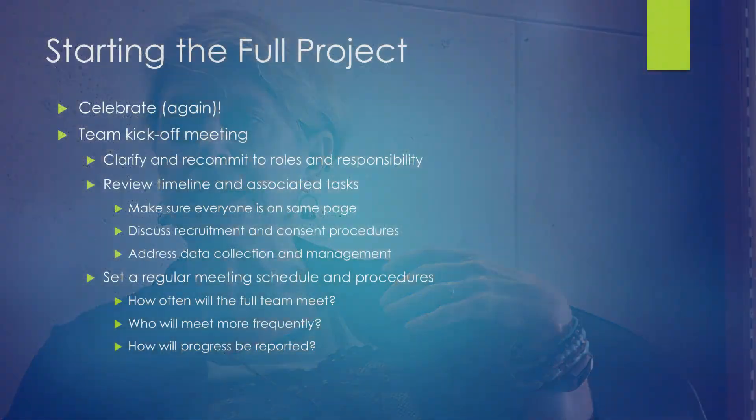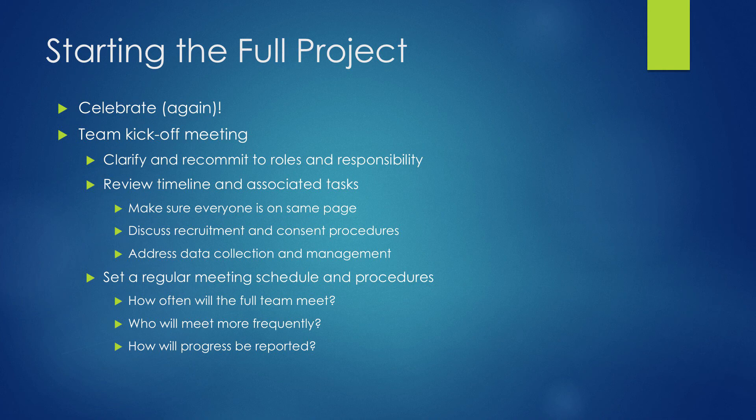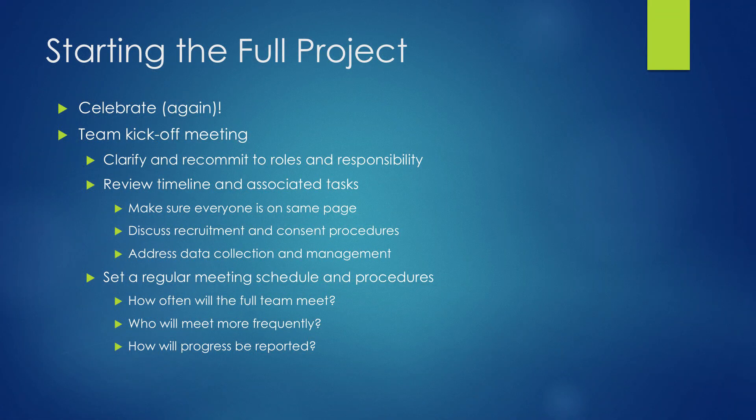That day arrives — you get your start letter from TSNRP through your grantee organization. Your very first step, of course, is to celebrate again, because that's really crucial. Then pull your team together and have a team kickoff meeting. This is essential. It's been likely a few months — people have spurred off and have other things on their mind. With a kickoff meeting, you bring everybody back together in person if you can — and even in this high-tech age, being in person is great — or at least virtually. Take the time to have a meeting to bring everyone together, clarify their roles and responsibilities, and recommit to those on the project.